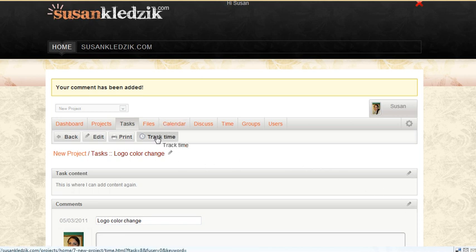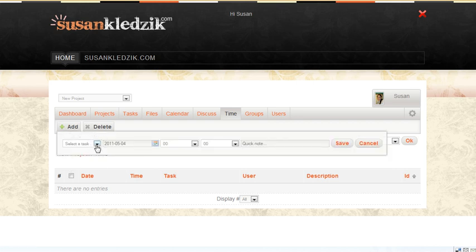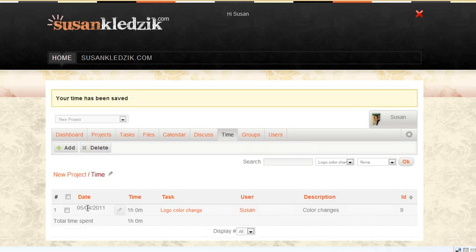The other thing up here is you can actually track time on this particular task. So if I spent an hour editing this, I can add my time here. So I would select the task, the date, say I did it today, and I could put here it took me an hour. And then I'll put in the notes, color changes, and I can save that. So now I have my time logged for each particular task, which is really helpful because if you have a lot of tasks going and you need to start tracking your time that you could submit for payment, you can keep track of how much you spent on each particular task.